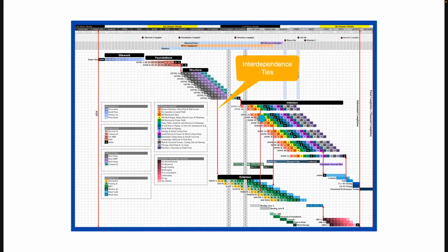There's also a diagonal dependence. If you look at Takt wagon number 4 flowing down through this phase, that diagonal dependence is indicating the need for trade flow. So that is another type of dependence. There are procurement dependencies, milestone dependencies, and always any dependencies that focus around trade flow, workflow, or logistical flow. So the Takt production system is chock full of logic. It is simply packaged inside the format itself.